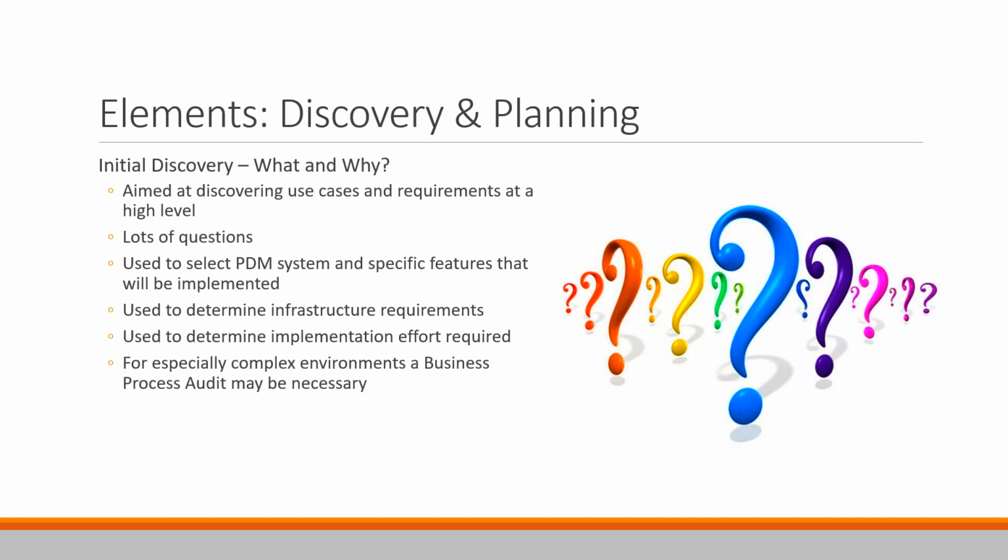Determining infrastructure is also a key part of this process. If you're a single site, do we have a server to put this on? Do we need to get any additional software, like SQL Server Standard Edition? If we've got multiple sites, do we need to replicate data? Can we get away with a remote connection? How many people do we have using it and where? But then also, determine what it's going to take to get the system in place, be it from a consultant, again, like Hagerman, or internally if you're planning to do the implementation internally. Do we have the right people with the right expertise, and how much of their time is this going to require to get done?